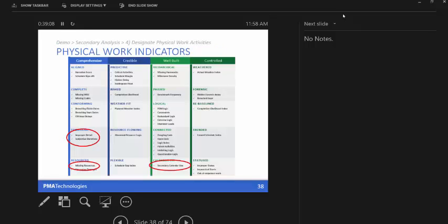Again, why am I going to bother to do this? Because some metrics are applicable to only physical work activities, and some aren't. And you can see a summary here. Improper detail, subjective duration. So does the duration of the activity correspond with my schedule level? So we look at physical work activities for that. If we're missing resources, that's something where for a physical work activity, we want to have resources, but something like bidding doesn't necessarily need a resource. We're not going to penalize you if an activity like that doesn't have a resource. And calendar use, etc.